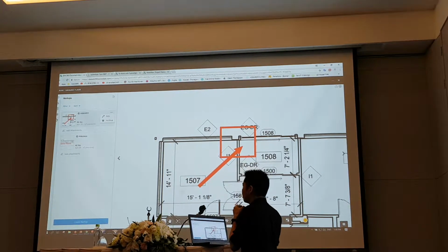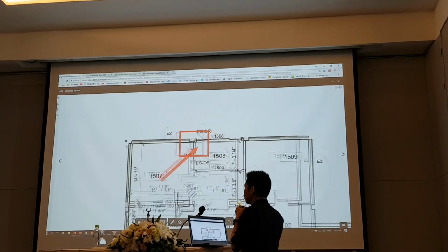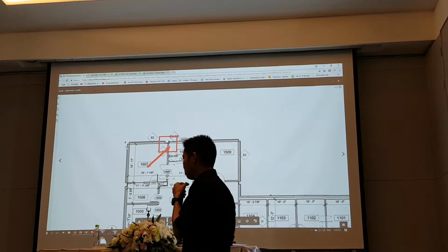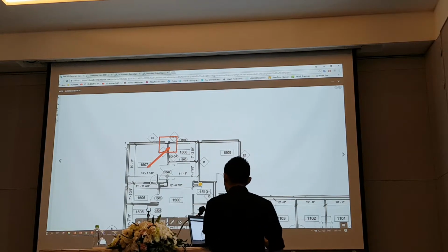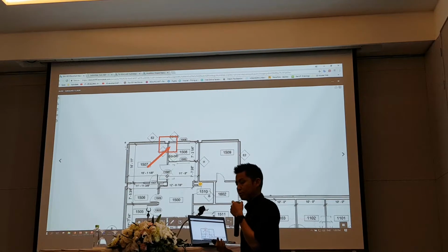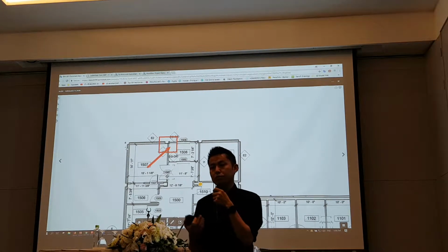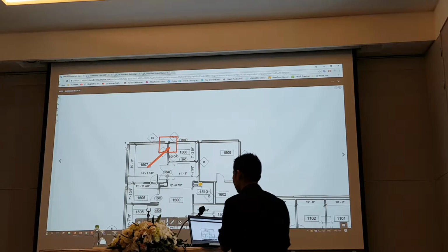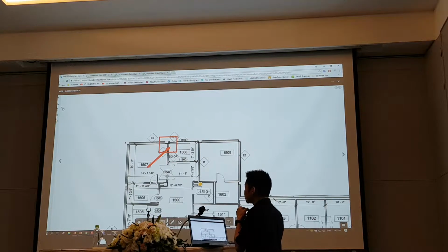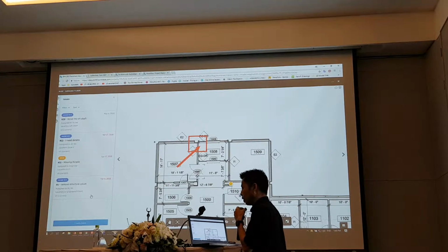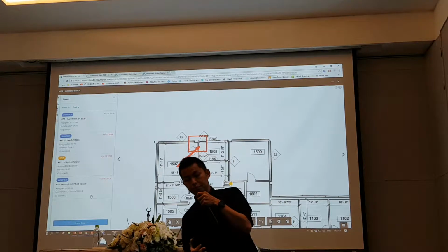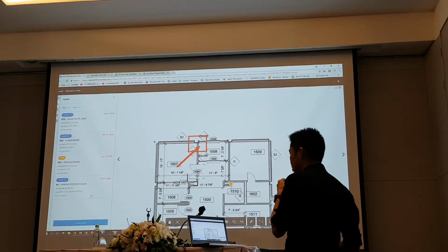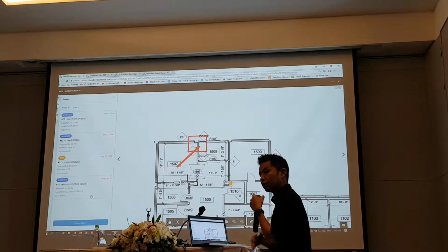Now, a lot of people get confused, because in document management we have two things, markups and issue management. A lot of people are confused about when to use issues and when to use markup. So you tell the customer, hey, during the design stage, early design, you use markup because it's faster, easier, and it's direct to a specific consultant. Now, you can raise issues when it goes into more detail, for example the pre-construction stage, where more consultants come in: engineer, M&E, landscape, civil, and so on.